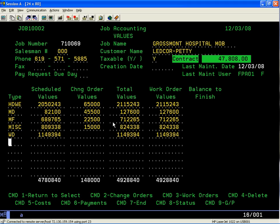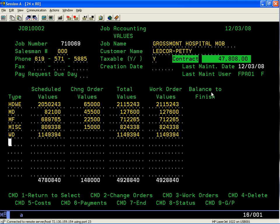Your work order values: as you generate work orders and start releasing materials to the job, your work order values will continue to increase and it'll show you a balance to finish.